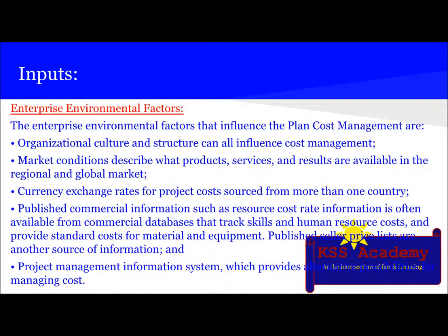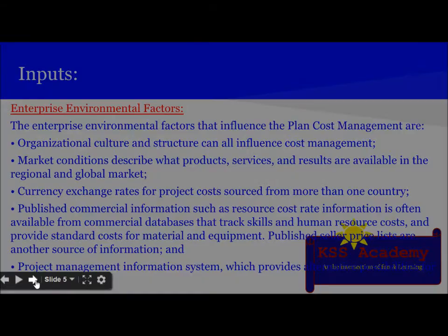Published commercial information such as resource cost rate information is often available from commercial databases that track skills and human resource costs and provide standard costs for material and equipment. Published seller price lists are another source of information. And the project management information system provides alternative possibilities for managing cost.